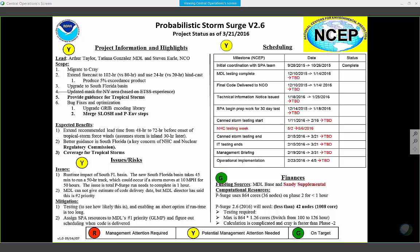Well, part of it is because we've combined it with all the other waves, this piece is something of a post-processing more than a full model. So if we do the Global Wave Ensemble, this comes along nicely with it. Okay, so part of the delay you say is packaging. Yeah. We will spend a lot more resources doing this as a one-off than to wait and do it along with a whole lot of other stuff. And the bundling should tentatively help us reduce the amount of shared code that we need to maintain. Okay. Got it. Thank you.